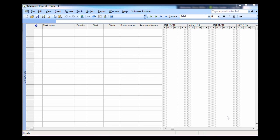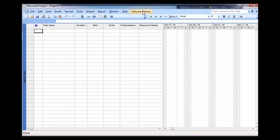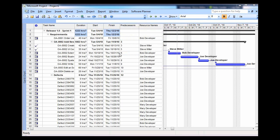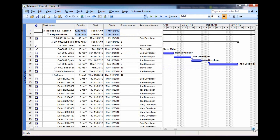One question we're asked a lot is: what if you've been using Microsoft Project and would like to bring a plan from Microsoft Project into Software Planner, or the reverse — take a Software Planner plan into Microsoft Project to use its more in-depth Gantt charts? You can do that. Simply install the Microsoft Project plugin and you'll see an item called Software Planner. To import a plan from Software Planner into Project, click Import, choose the name of the plan, press Import, and it will import the plan into Microsoft Project so you can see the Gantt chart very clearly.